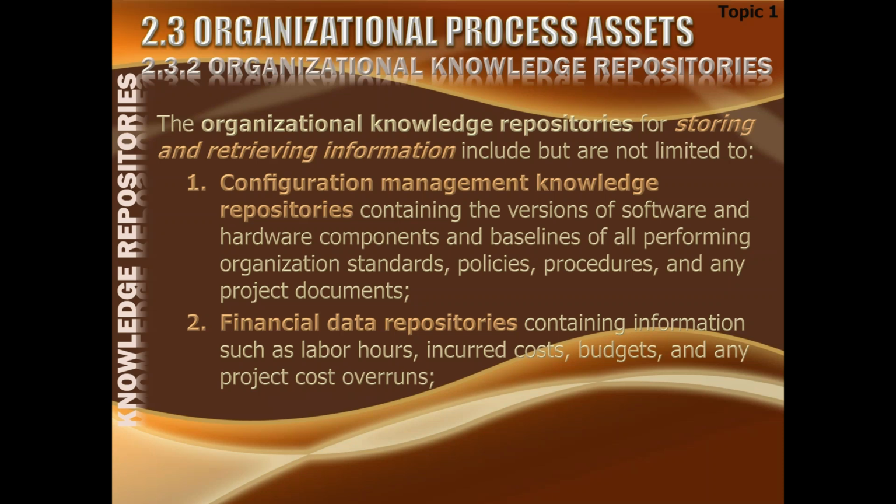Change management plan just tells me how to move a change request, how to get it processed, and how to get it approved. Once the change request is approved, how to update the relevant documents. This all is taught to me in the change management plan.